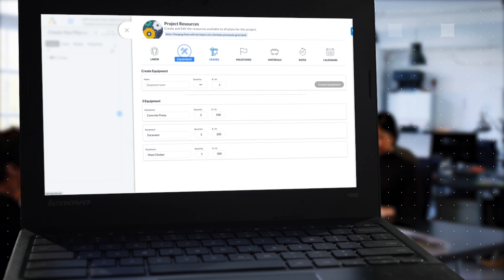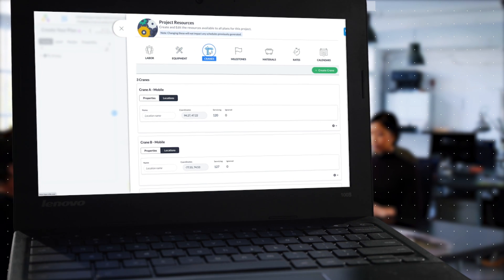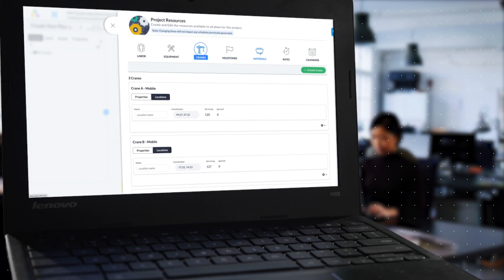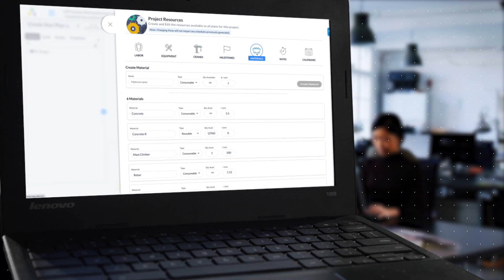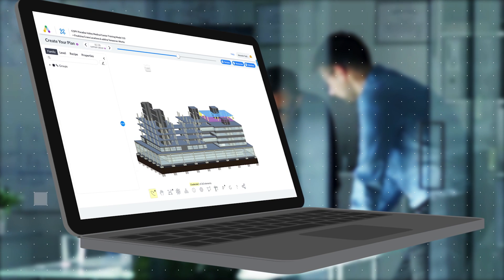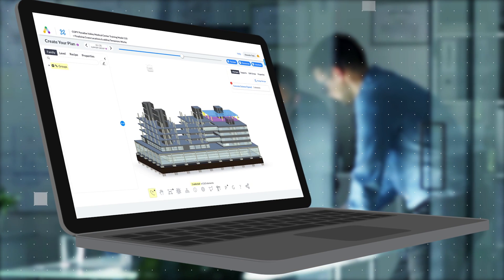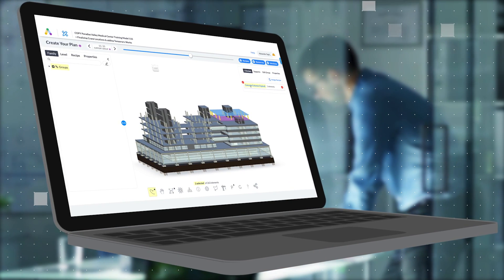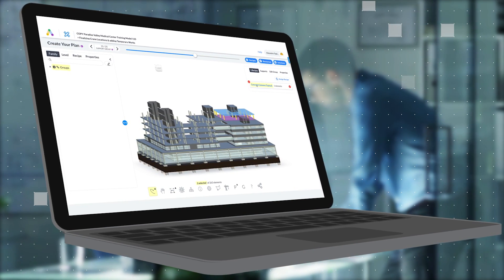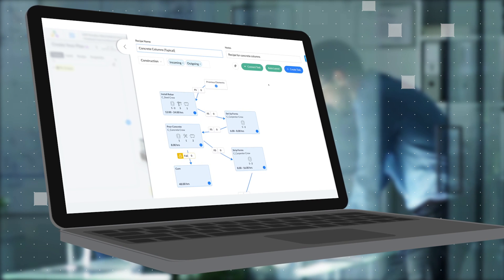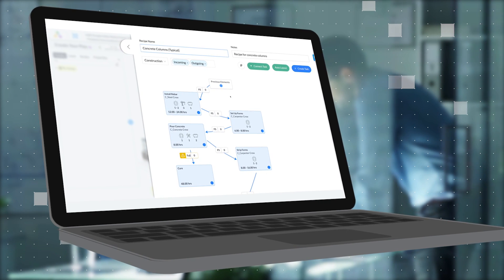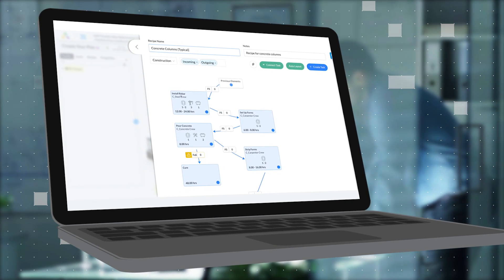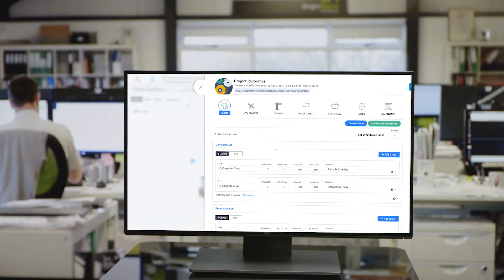The fun begins when you input your construction methods, which are represented in Alice as recipes. Recipes contain the required tasks, resources, and logic to complete an element of your project. You can reuse recipes or improve on them as you learn between projects.